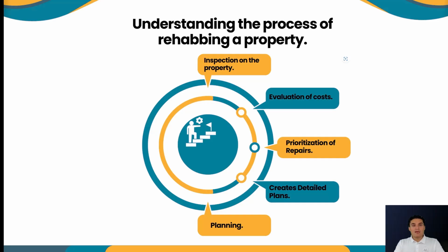Okay, now that you prioritize the roof, you need to change some other items that you were thinking of doing. Let's say you wanted to make a high-end looking kitchen. Now don't do that anymore. Now you need to change the plan and have something basic. Maybe instead of the kitchen costing you $13,000, it can only cost you $9,000 or $8,000. So you minimize the risk and you minimize the investment that you need to make in order to have the equal gains that you first thought you needed. Same thing with the AC.